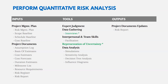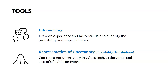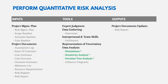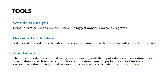Two key tools are interviewing and representations of uncertainty. Interviewing draws on experience and historical data to quantify probability and impact. Representations of uncertainty use probability distributions to represent uncertainties in values and give an idea of potential impact on durations and cost. Other data analysis techniques include simulation, sensitivity analysis, and decision tree analysis. Sensitivity analysis determines which risk could have the biggest impact, sometimes shown on a tornado diagram. Decision tree analysis calculates the average outcome when the future includes uncertain scenarios.